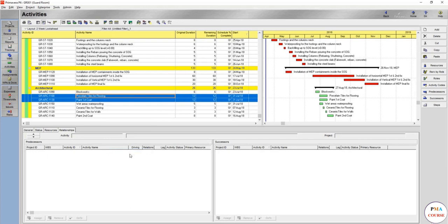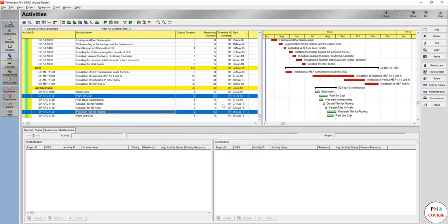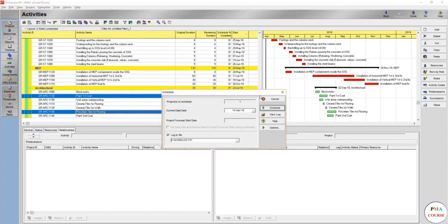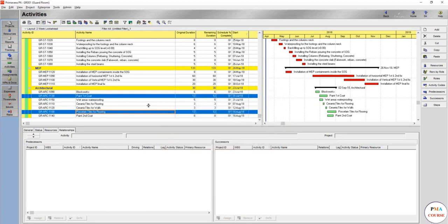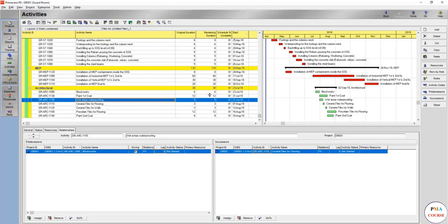It depends, by the way. There are a lot of methodologies. There is nothing that says no, we are going to do such a thing. Because with paint first coat, you're going to put the putty, repair the concrete walls, do a lot, put a primer, then put your porcelain. It can work. Or you can put the porcelain tiles to avoid any messy activities, then do your paint first, then clean your porcelain. All can work. And here we're making a schedule to learn P6 and to be more professional in P6, using a real case study to better relate.